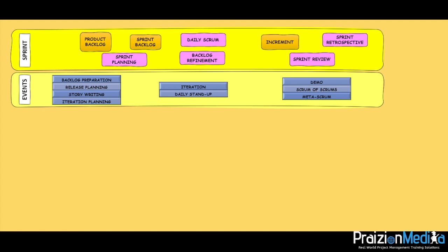The daily meeting is conducted similar to the daily stand-up in Scrum, where the representative reports completed work, the next set of work, any current impediments, and potential upcoming impediments that might block the other teams. The goal is to ensure that the teams are coordinating work and removing impediments to optimize the efficiency of all the teams. Large projects with several teams may result in conducting Scrum of Scrums, and so on and so forth. It follows the same pattern with the Scrum of Scrums. So keep that in mind. You could find this on your professional exams referred to as a meta Scrum as well.